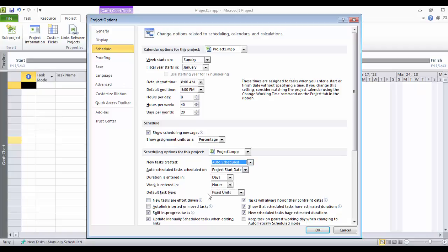And then the next would be changing the task type. So we have here different types, and from my experience and observation of the industry, the best way that fits how construction planners and schedulers build their schedule is to use a fixed duration type for the tasks or the activities. Again, this is a generic scheduling tool, Microsoft Project. And in construction, the way we do it is we do the quantity takeoff, estimating durations, and of course, based on what crews we get to use.